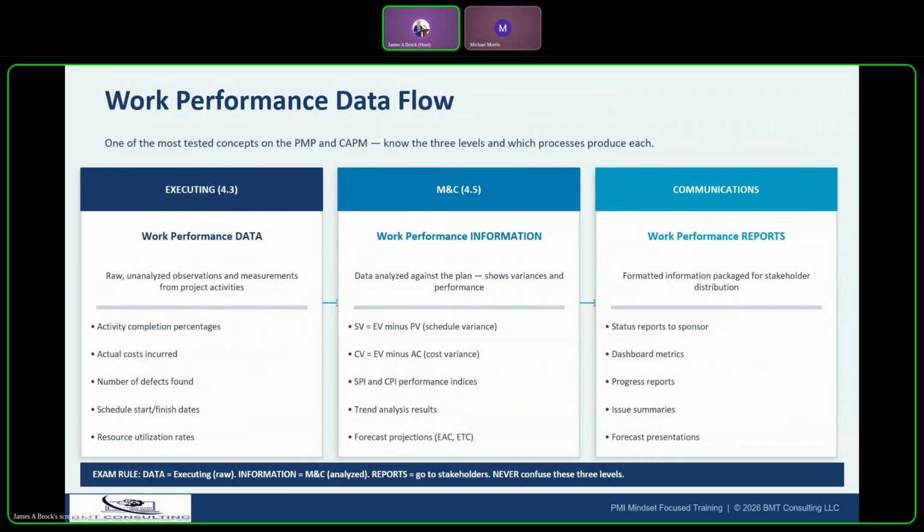It's okay. So that's the scope baseline, the schedule baseline, and the budget baseline, right? So here you're going to take that raw data. Now we're going to analyze that data and make it information, right? So data is just data until you analyze it. Once you analyze data, it becomes information. At that point, we can now use our different tools, earned value management tools, and we can calculate where exactly our project is based against our 3 baselines, which are scope, schedule, and budget.